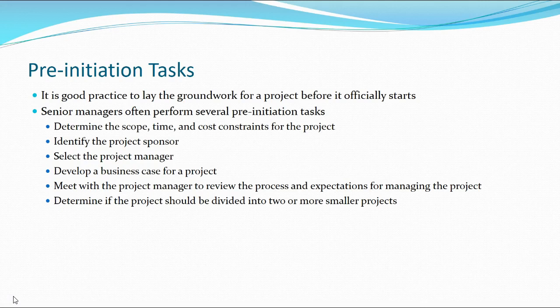For example, is a project too large? If we're a small contractor, can we possibly take on a project the size of that which they want us to take on? There are examples of when companies have taken on projects that were too large for them. One of the great examples from recent history, when there was the aftermath of the hurricane in Puerto Rico, an electrical company from the Midwest got the contract to restore power to the entire country and lacked the resources to really be able to pull off the project.